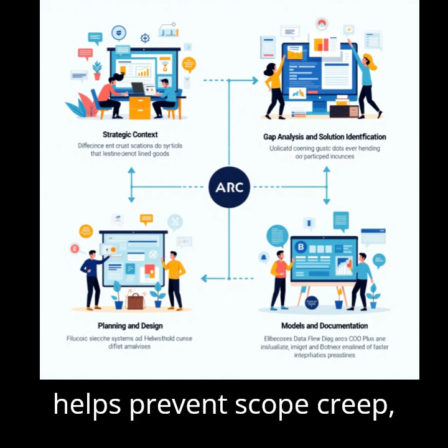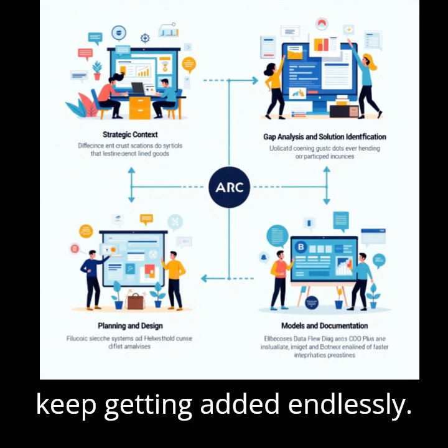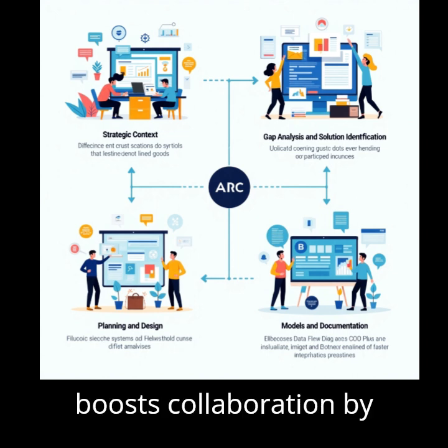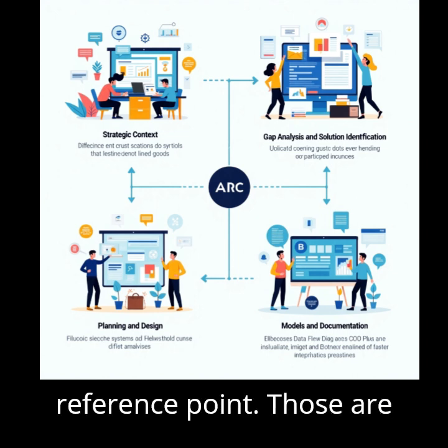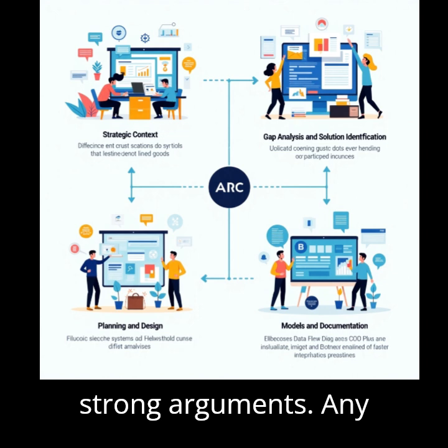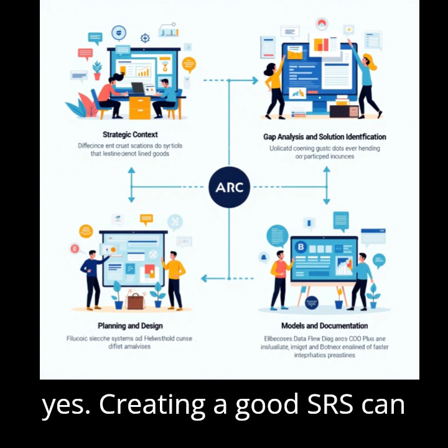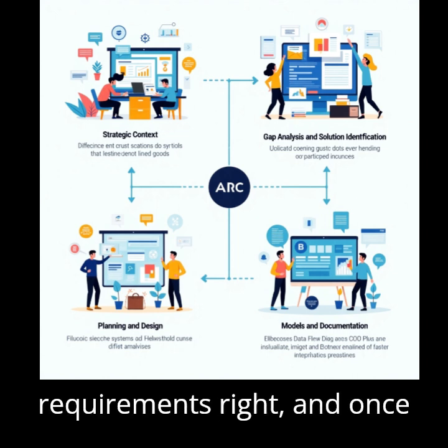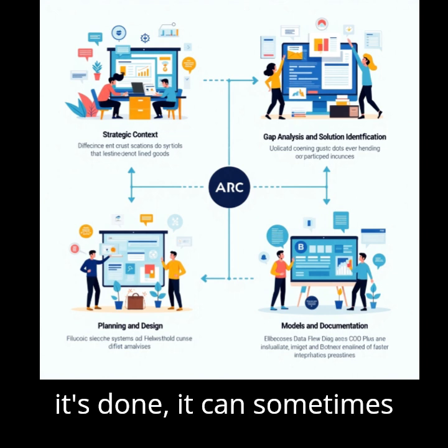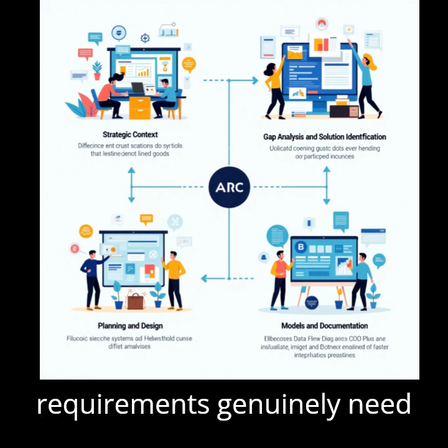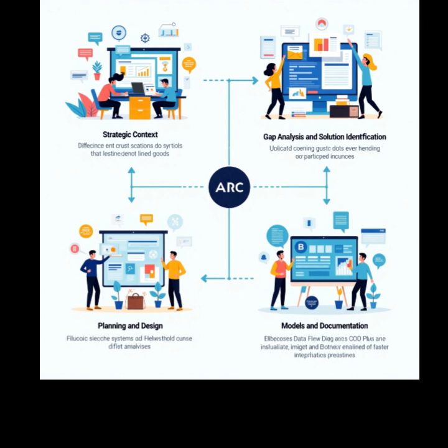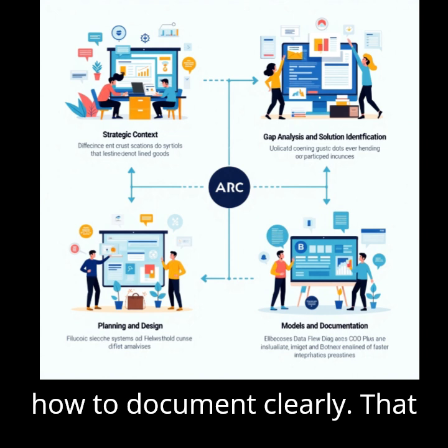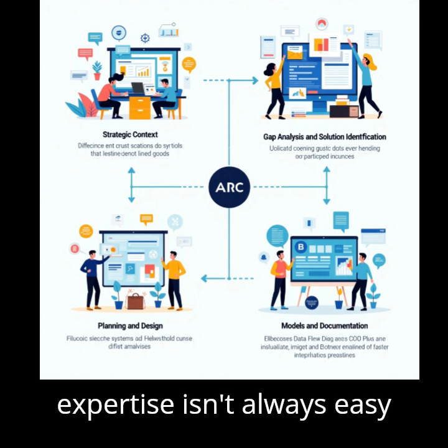It helps prevent scope creep, that thing where features keep getting added endlessly. It makes testing easier because you know what you're testing against. And it boosts collaboration by giving everyone a shared reference point. Those are strong arguments. Any downsides or challenges? Well, yes. Creating a good SRS can be time-consuming. It takes effort to get all those requirements right, and once it's done, it can sometimes feel a bit rigid if requirements genuinely need to change later. Plus, writing a good SRS requires specific skills, knowing how to ask the right questions, how to document clearly. That expertise isn't always easy to find.